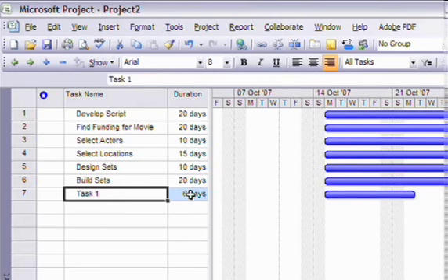If this task were something that is not dependent on a work week or a work day, let's say we were painting the office, and I have this task, and this task is going to be an amount of time for that paint to dry. Well, paint doesn't exactly work on our working calendar. Paint's going to dry 24 hours a day, and it doesn't care about weekends. It doesn't stop come Saturday and then start drying again on Monday. So, how we achieve this quickly and easily is something called elapsed time.